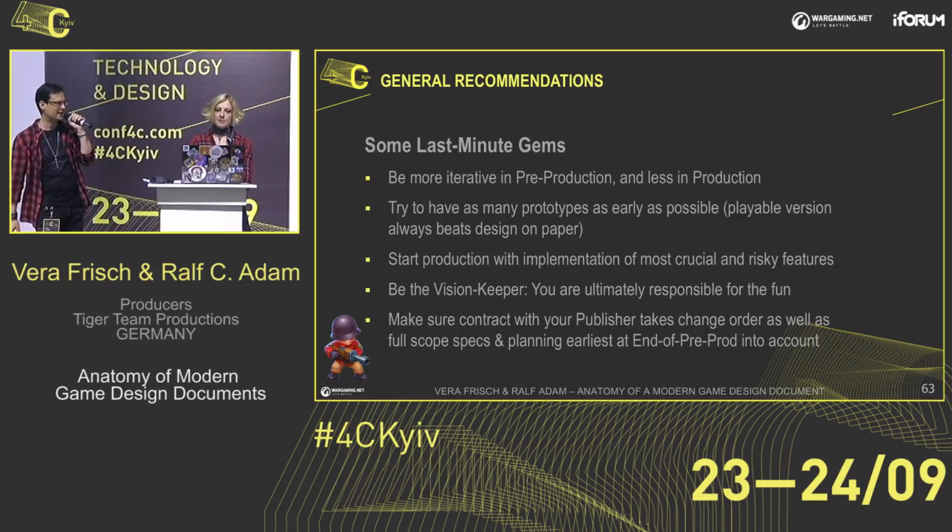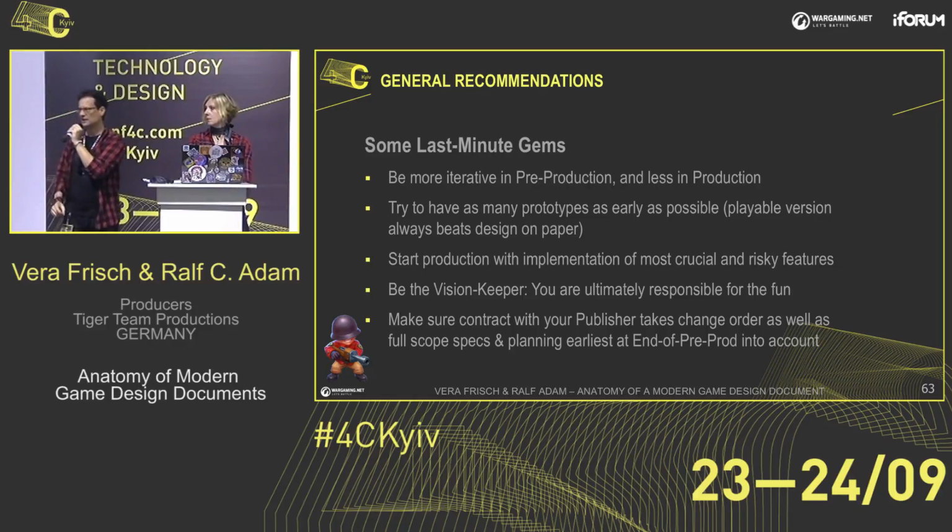And again, like I've mentioned a couple of times before, make sure that your contract really states that when there are changes to an agreed design that affect budget, once both parties agree to it, you also get the budget from the publisher. Publishers are great with coming up with great ideas and changes all the time, but they usually shy away from giving you more money once they agree to a budget.